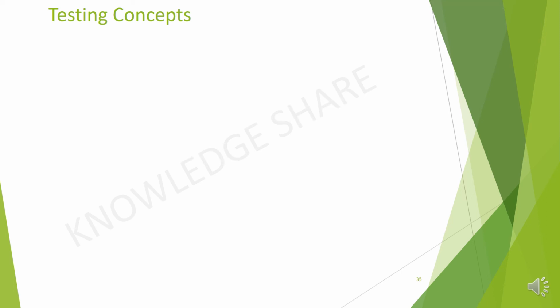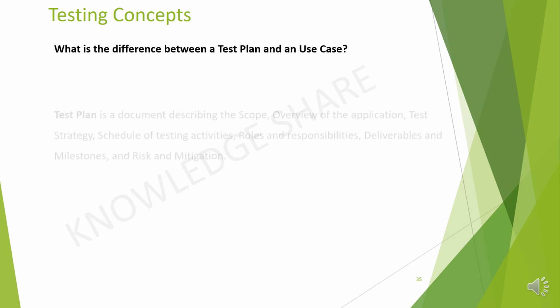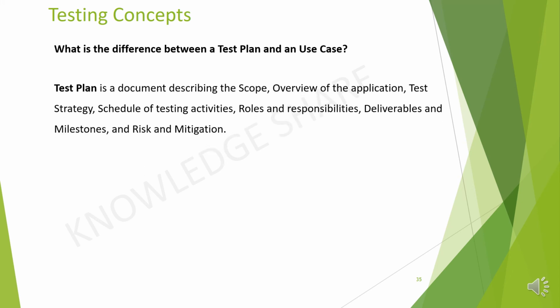Next question, difference between a test plan and a use case. Test plan is a document describing the scope, overview of the application, test strategy, schedule of testing activities, roles and responsibilities, deliverables and milestones, and risk and mitigation.